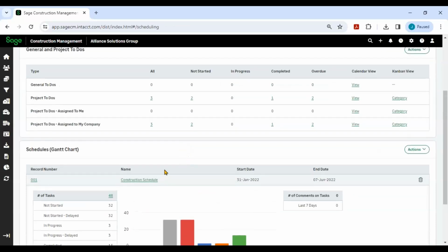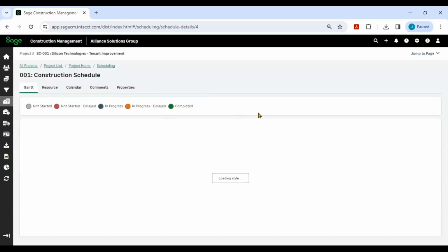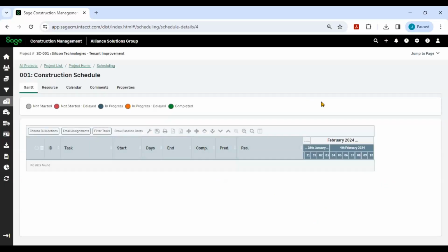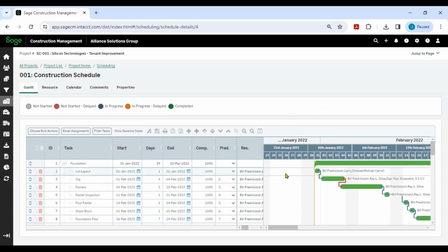When I open this up and I drill into this construction schedule, a lot of you might go, well, that's what I do now. As I mentioned, it just doesn't quite have that same type of power. Yes, I can put predecessors on here, but I expected if I was to move this over here like that, that all the stuff below it that it was a predecessor to would move for me, and it doesn't. So that's why a lot of people will use something like Microsoft Project, because we can actually bring that directly in here and then share that across all of our vendors.